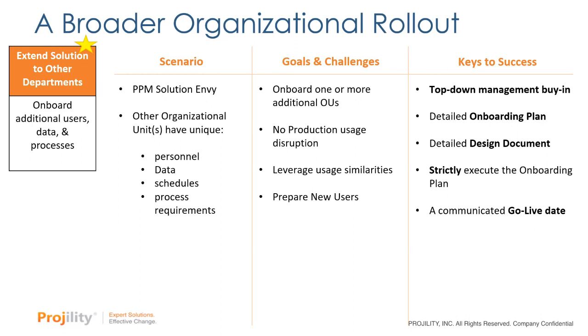So we don't want to keep all of our participants sequestered the entire time. So we would definitely want to plan out accordingly so there's the least amount of impact to our participants. Inside that onboarding plan, we're also going to want to list out the types of training that is going to be required. Are we going to need to bring project managers up to speed? Are we going to need to provide some insight into the tool usage for team members or for executives? So all those should be identified.